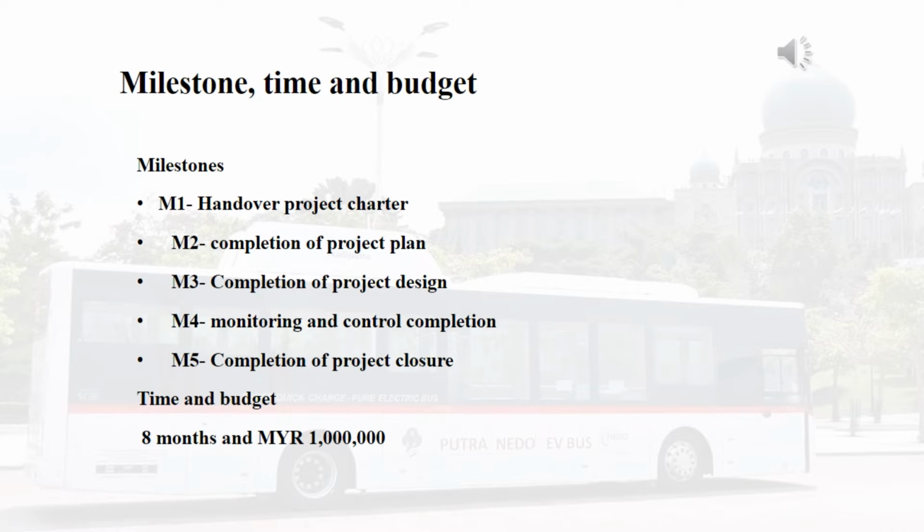As such, the preparation of the milestone chart is established to cover the following: M1. Handover project charter. M2. Completion of project plan. M3. Completion of project design. M4. Monitoring and control completion. And M5. Completion of project closure. So, the time and budget for this project will take 8 months for the project to complete and will involve a cost of 1 million ringgit Malaysia.